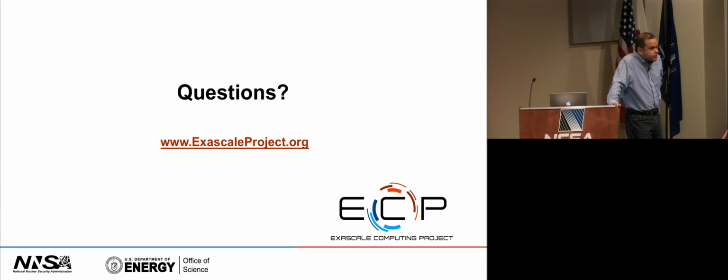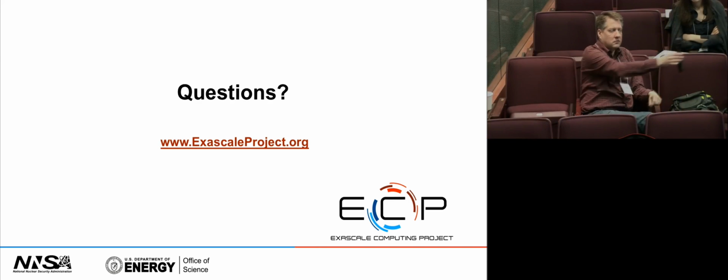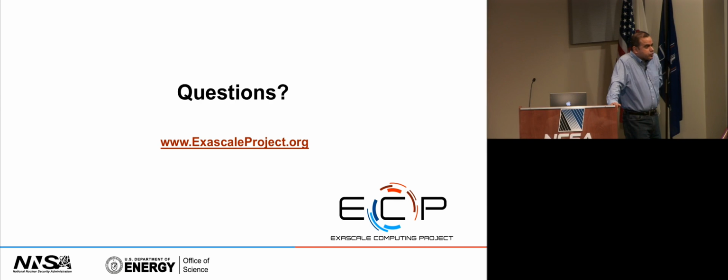So when do you expect to be able to narrow that space down? So in a year or two, we'll be closer to knowing what the system is, and we may be closer to knowing which among the applications will be the more critical ones, that will be counted towards the KPPs and so forth. So we need to make sure that those get fully supported. A bigger risk is also the budget. If the new guidance we get is lower, then some things come off just because we can't afford them.